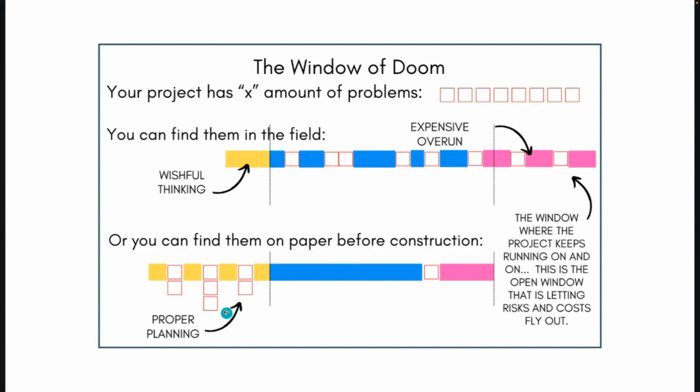In order for you to do that, you are going to have to really get good or really get used to using these macro and norm level TAC plans and be able to do a fresh eyes meeting or a risk review with those schedules so that you can find your problems and prevent them before you go into construction. And then, like I said, if you have to summarize in CPM from a contractual standpoint, go ahead and do it.